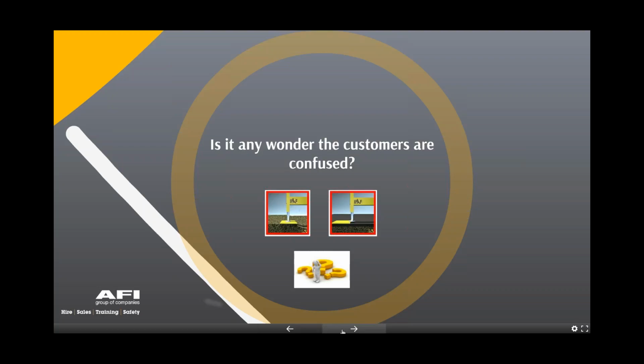Under the CPA terms and conditions, the hirer is deemed to have knowledge of the site or the property or land where the plant is to be delivered, and the hirer warrants that the condition of the site or place of delivery of the plant is suitable. If in the opinion of the hirer, the ground is soft or unsuitable for the plant to work on, travel on, be transported on, be erected or dismantled on without timbers or equivalent support, the hirer shall supply and lay suitable timbers, we still talk about wood, or equivalent support in a suitable position for the plant to travel on, work on, be transported on, erected or dismantled on.